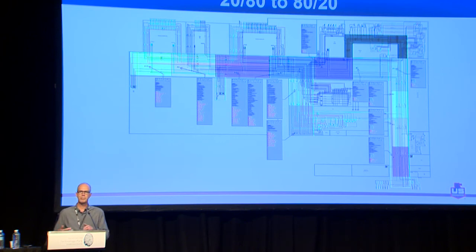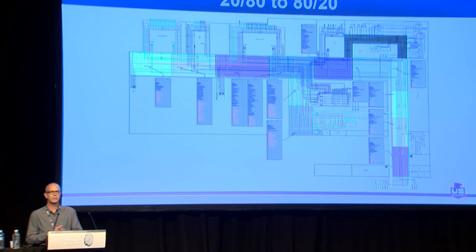And when we started talking about the benefit of doing this, well, the benefit is they're going to start brewing beer faster if we can help them do this. Okay, the owner understands that. And so all of a sudden, it's a priority on the job for us to be able to get in 40-foot long piping bridges, where it wasn't before. So my encouragement here to you is to really plan that from day one and start talking to people about it.